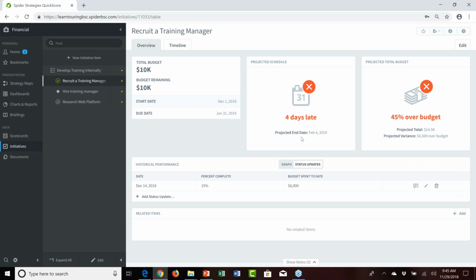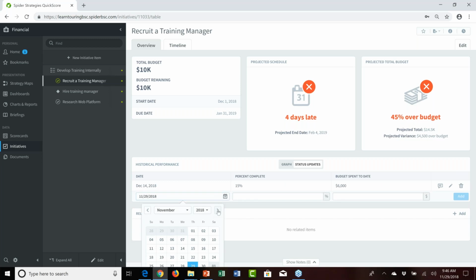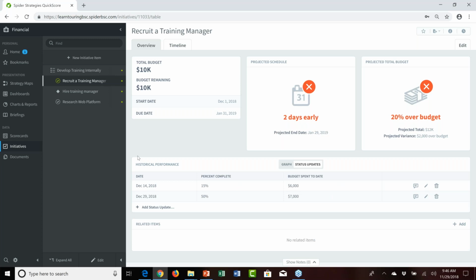Okay, and then while I'm at it, we'll add another status update while we're working on this one and say at the end of December 2018, we believe that we were 50% complete, and we had spent $7,000 to that point. And we'll click add. Okay, so we're doing well in terms of providing information there.